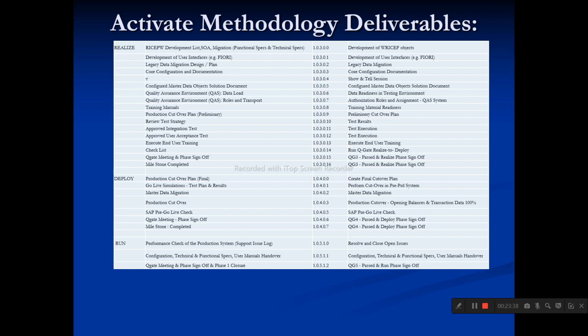So finally, there is user acceptance testing, right? Before you do user acceptance testing, what is the landscape? Which client are we going to execute the process in, and who are the persons? Before executing, we have to make sure roles and authorizations are created and assigned to the user, correct? Then only can the user test the process with his own authorizations, right? So whether he can create the material, or create the purchase order if he is related to the purchaser.